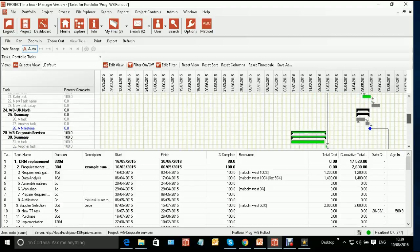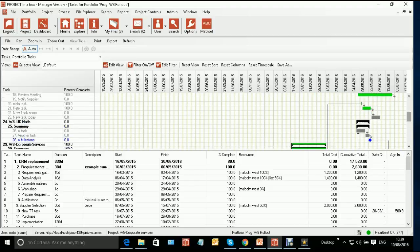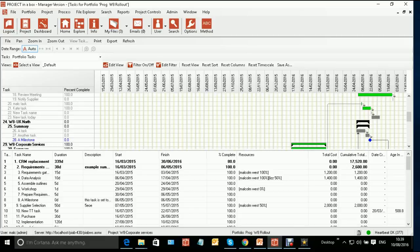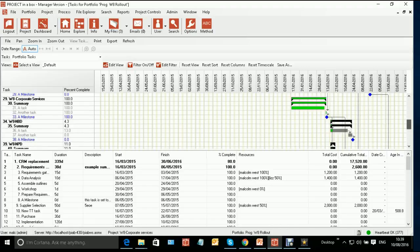So those are a couple of simple rules. Only have dependencies to tasks which are not dependent on something in their own plan. And that's often, therefore, people using the first task in the project. They have a milestone for project start, and that's what they're driving from some of the tasks in other projects.